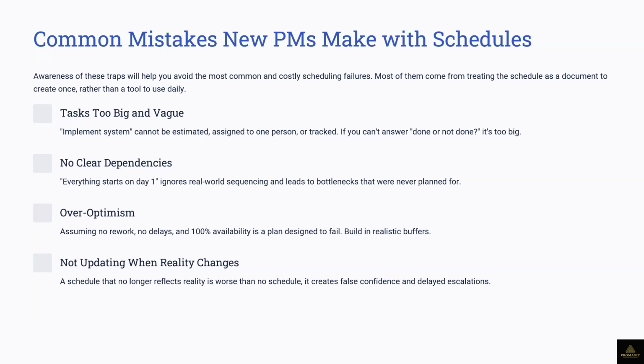But that particular activity, I've said 5 days, not 10 days. But at the end of the day, it still does not affect the end date. And that's the reason why we've gone over that. If that activity has a float, you don't need to talk about it. But once it affects the end date, you have to explain to the client. So please, you have to prepare why you can no longer finish on that particular day you originally promised.